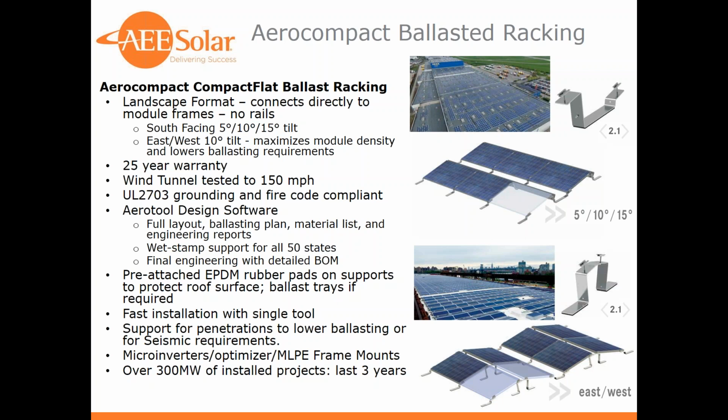Final engineering comes with a detailed bill of materials. The engineering reports that are generated, the normal ones without the wet stamp, are mostly accepted by the jurisdictions without having to go through the wet stamps. They're very detailed. There's a standard report and a very detailed report. If they want to see every calculation of every penetration, we can show that if needed.